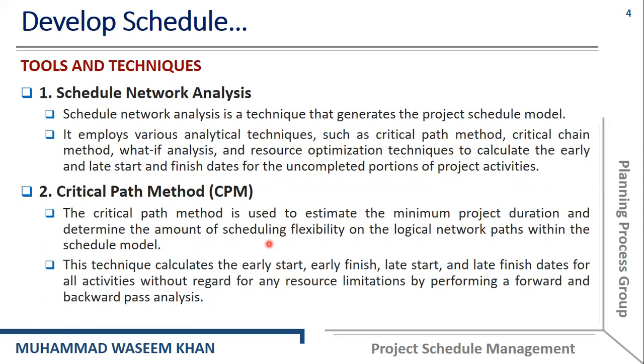The first tool and technique that we can use for developing the schedule is schedule network analysis. Schedule network analysis is a technique that generates the whole project schedule model. It employs different tools or techniques such as critical path method, critical chain method, what-if analysis, and resource optimization techniques to calculate the early and late start and finish dates for the uncompleted portions of the project activities.